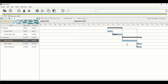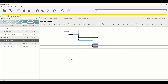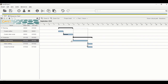You can also set the completion percentage manually by hovering the mouse over the task until you see the hand cursor, then moving to the start of the task until you see a black arrow with a small percentage indicator. Hold the right mouse button and drag to set the percentage intuitively — for example, setting it to 35% complete.